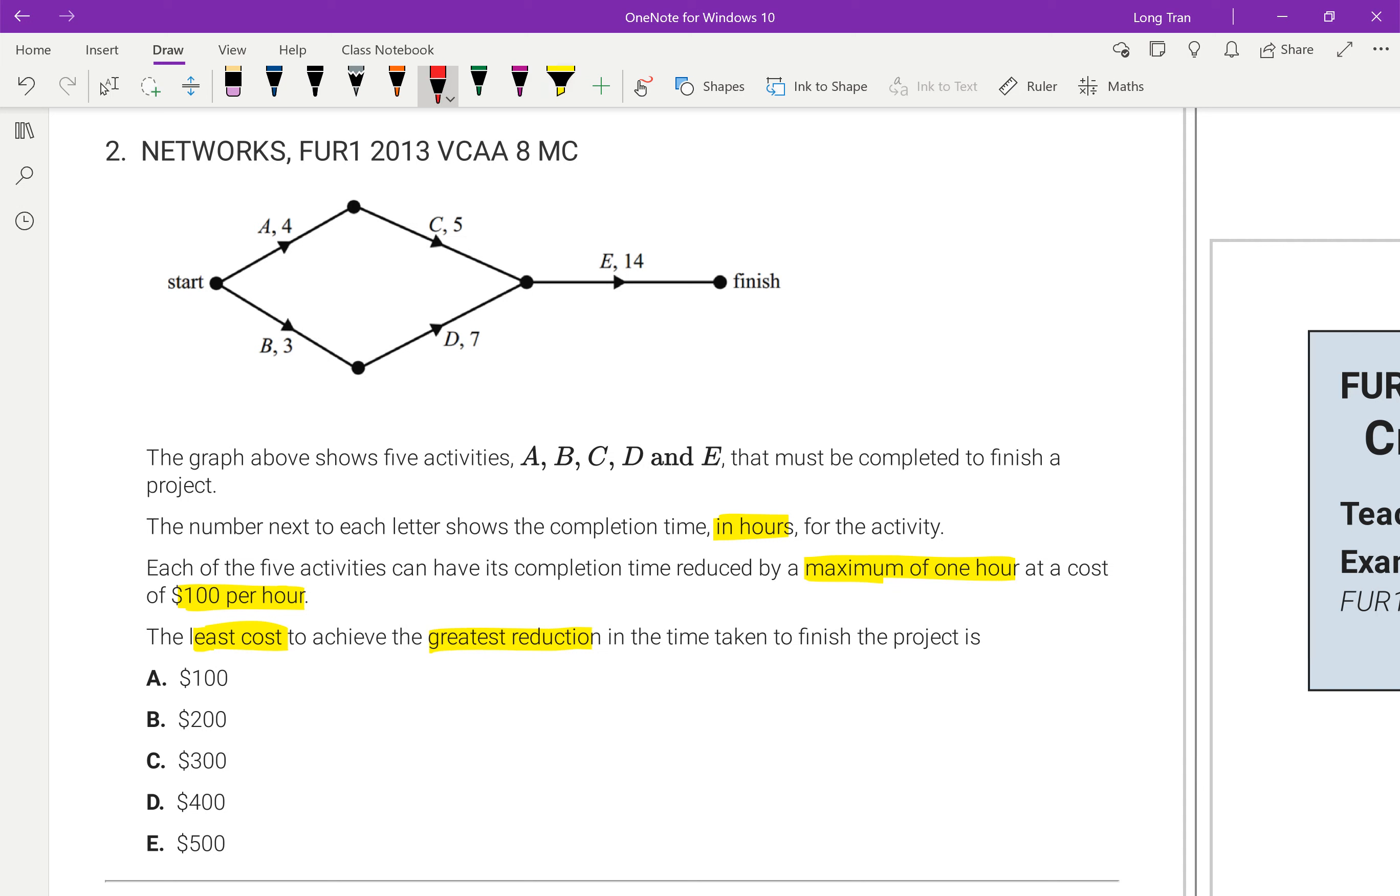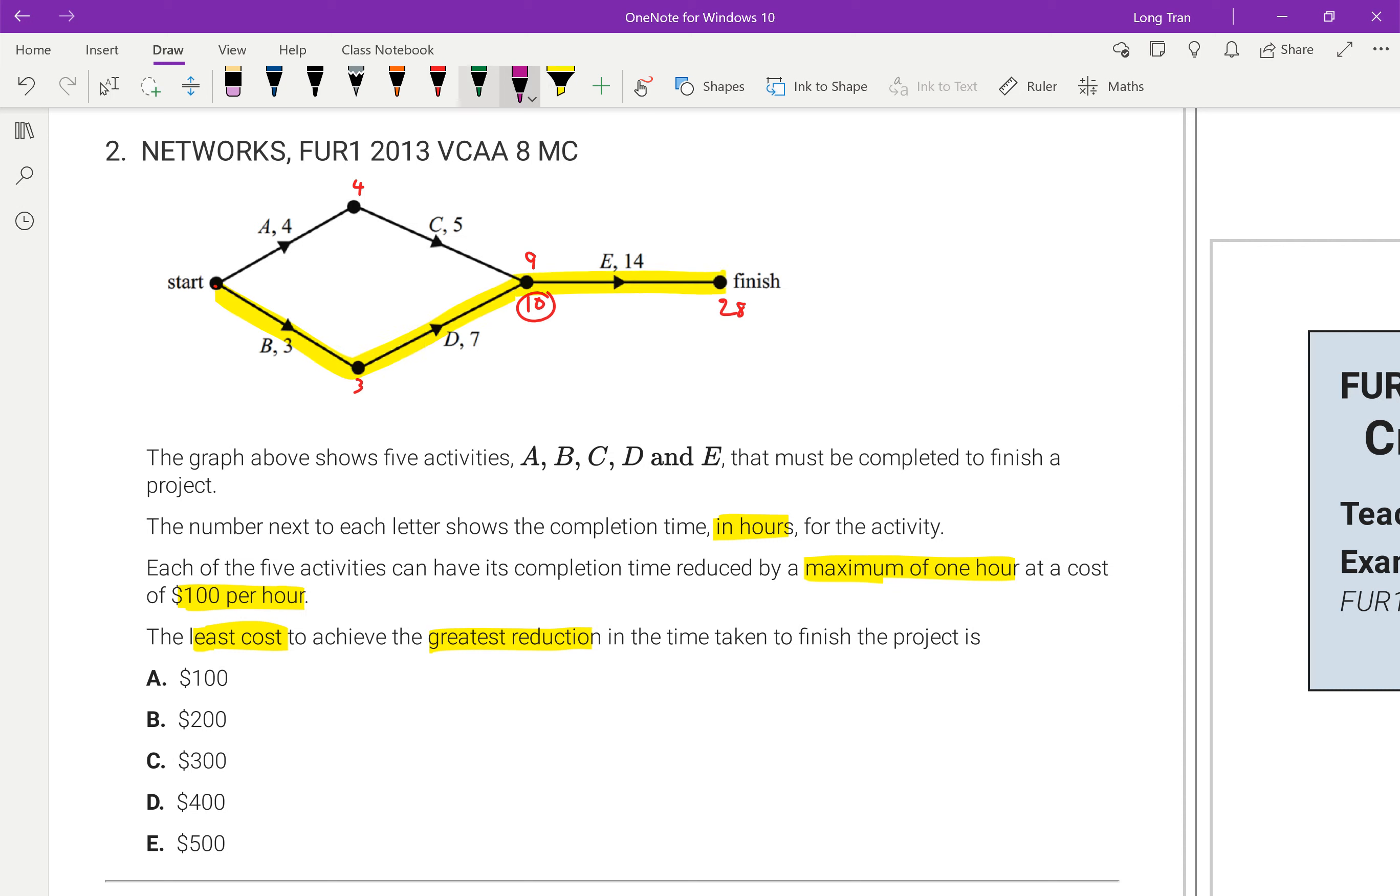So here we go. Activity A, if I went up here, that's 4. 4 plus 5 gives me 9. Whereas if I went on the bottom, that gives me 3. 3 plus 7 gives me 10. So clearly 10 is a bigger value. And then 10 plus 14 is 28. So my critical path is this. That's my critical path. So if I had gone with a 9, 9 plus 14 is then 27.